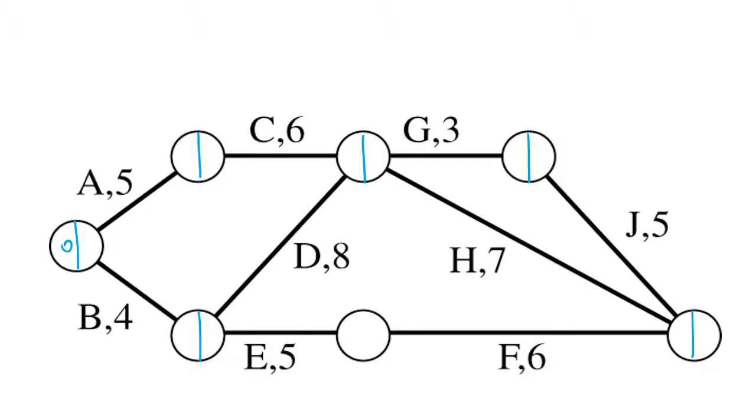So we start at 0. Now 0 and 5 is 5, 0 and 4 is 4. So I've gone to the first nodes out. Now I'm going to go to the second nodes out. Now 4 and 5 is 9, 4 and 8 is 12, 6 and 5 is 11. Now the bigger number is the important number here, because if I delay D, I delay the whole project. So that's going to be a critical activity. So I know pretty well straight away that this part is critical.